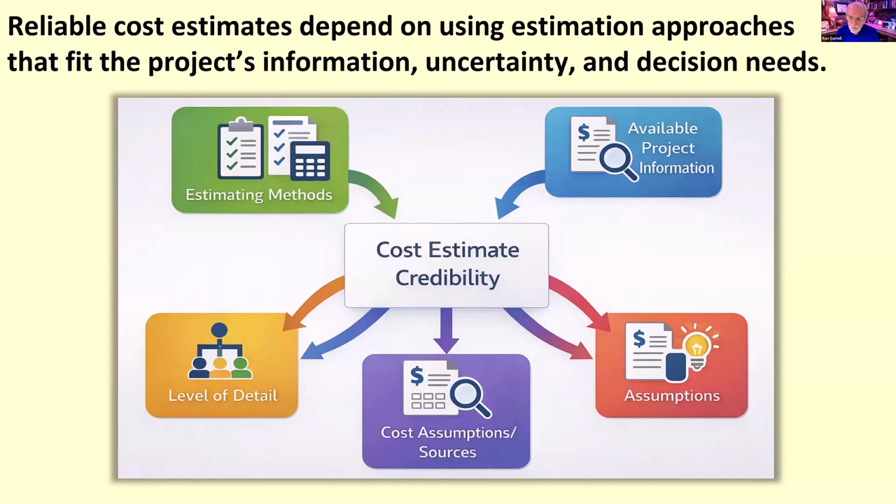What happens a lot of the time in real life, you'll be asked to provide an estimate on an activity and somebody will say, well, that's 8 hours. Well, if it's early in the process, that could be correct plus or minus some order of magnitude, 50 to 150%. There's a concept called the cone of uncertainty that depicts this.